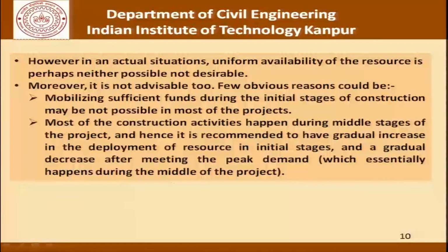We have talked about the S curve and its relevance as far as project progress is concerned. There are lots of reasons why most projects follow this S curve. In the initial part, it is not only the mobilization of funds, but it is also the learning experience, availability of front. All these kind of issues make it very difficult to achieve a progress which can be sustained all the time. But having done that initial experience of learning, it is much easier to gradually increase the resources, reach a peak level, and then taper it off.